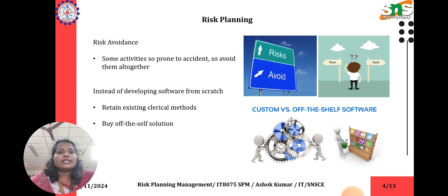Risk avoidance: some activities are so prone to accidents that you avoid them altogether. Instead of developing software from scratch, retain existing methods and buy off-the-shelf solutions. Here I give the comparison of custom versus off-the-shelf software.